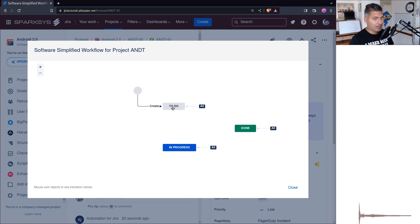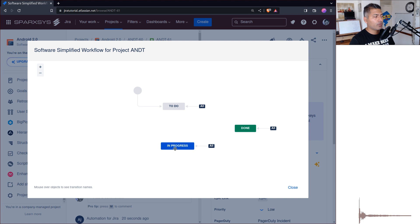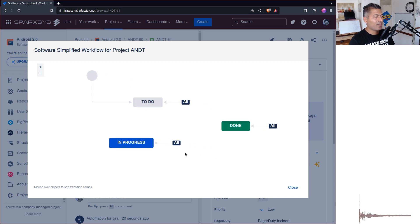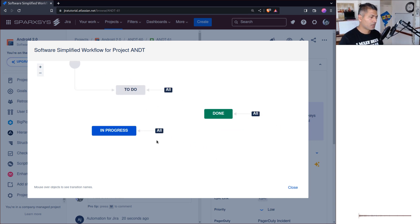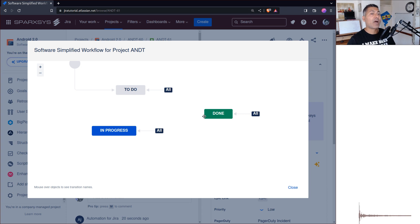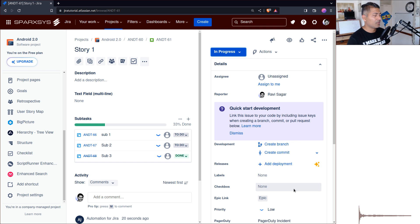Usually the issue lands in a To Do or Open status, and when you're done with your work the status could be Done, Closed, or Resolved. For example, with a workflow that has To Do, In Progress, and Done — imagine a bug with status To Do that you move to Done. By looking at the status only, you won't be able to figure out whether the bug was actually resolved or not. The final closure is identified with the help of a resolution.